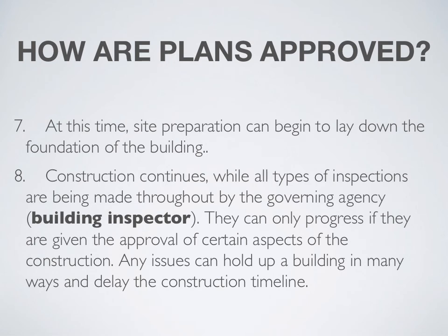At this time, site preparation can begin to lay down the foundation of the building. Construction continues while all types of inspections are being made throughout by the governing agency or the building inspector. They can only progress if they are given approval for certain aspects of the construction, and any issues can hold up a building in many ways and delay the construction timeline.